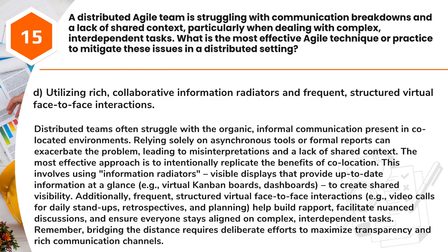create shared visibility. Additionally, frequent, structured virtual face-to-face interactions, e.g., video calls for daily stand-ups, retrospectives, and planning, help build rapport, facilitate nuanced discussions, and ensure everyone stays aligned on complex, interdependent tasks. Remember, bridging the distance requires deliberate efforts to maximize transparency and rich communication channels.